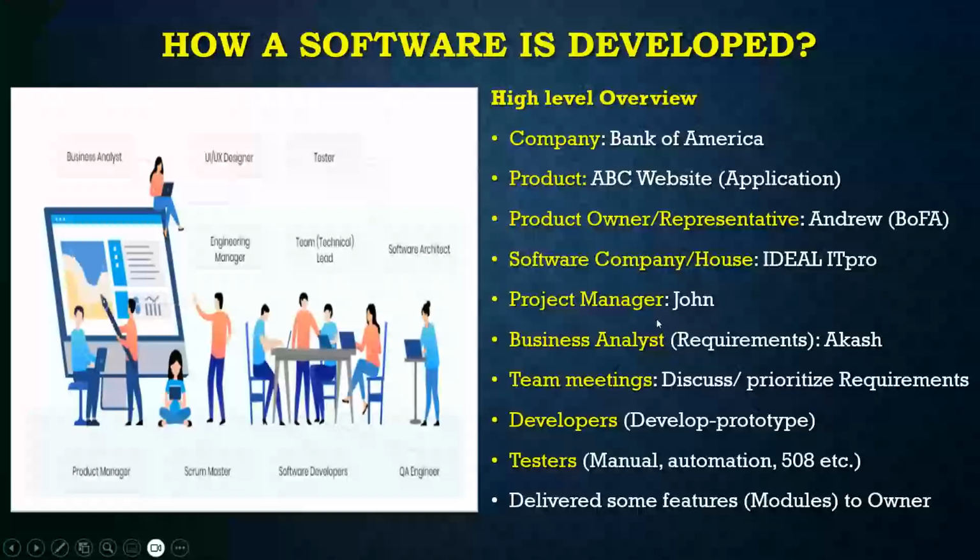Let's say your representative or product owner gives you 100 requirements, but you are not able to develop 100 requirements at the same time. So you will prioritize those requirements as high, medium, and low priority. After that, your project manager and business analyst provide those requirements to the developers, not you. Your job is still just to understand the requirements.